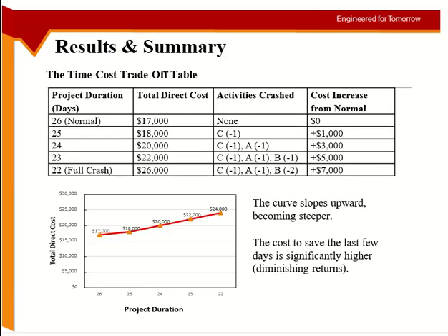What we saw in this example, if you increase one day, it will have this much impact because of this activity. So this is direct cost because of that activity. I'm increasing labor, I'm hiring two people, or I'm hiring two machines, or I was doing it manually, now I'm doing it using a device or equipment. So this is like the direct increase in the cost. So that's why we can put it with an activity.